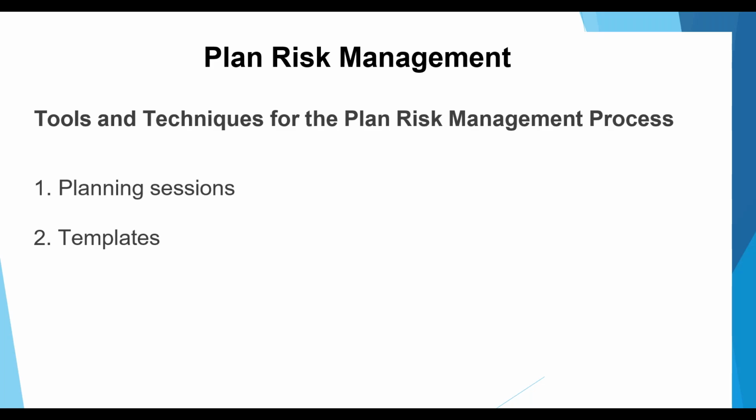You need to engage all the stakeholders. You need to develop a planning strategy for how to tackle different types of project risk once identified, and gain agreement from project stakeholders on the techniques to be used for managing risk. So this is one of the planning cycles of the risk management process. And at this point, the initial risk responsibilities, methodologies, templates, terms or definitions, and other tools and techniques should be assigned and accepted by all the project stakeholders in this particular planning session.